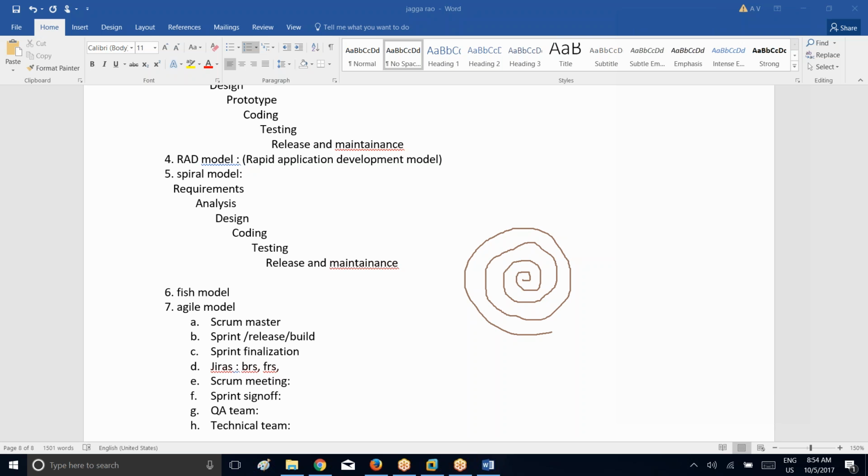I have one question. How can the development team develop the application and the testing team test at the same time, before the developer finishes their part? They will not do testing. They will write the test cases. They will prepare the test cases from their end by looking at the BRS, FRS, and SRS. Once the application is ready, they will test it. You understood, right? See, everyone will get the BRS and FRS documents. Simultaneously, the developer will go ahead and try to develop the application, and the testing team in the meanwhile will try to write the test cases. So once the application is ready, then they will try to test the application. Okay? Any questions?